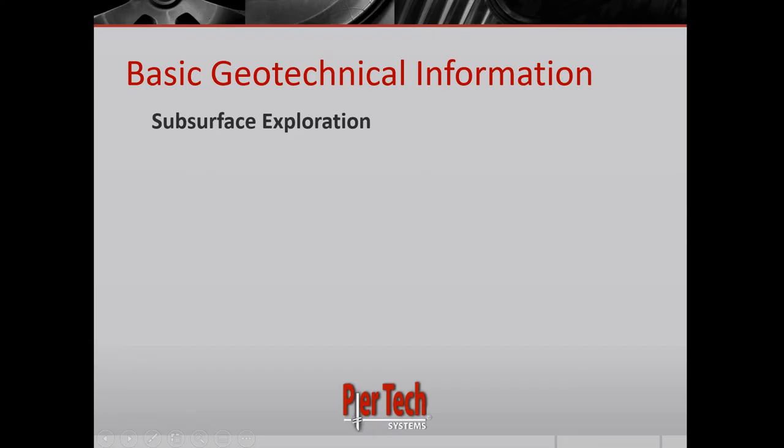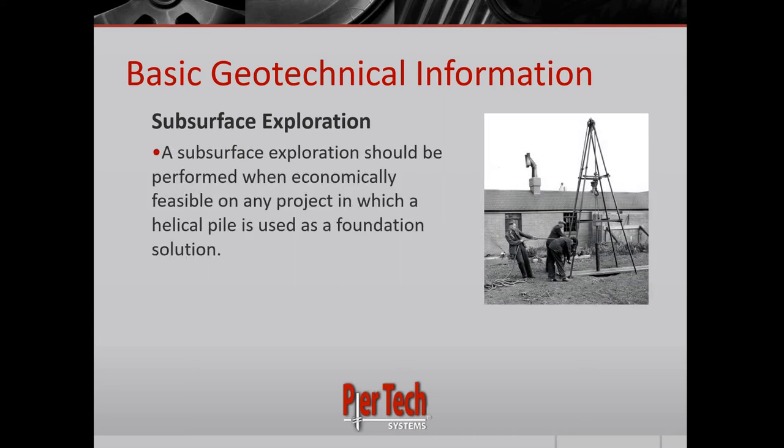A subsurface exploration, or as a lot of you know it, a geotechnical report, is very important to get and perform whenever economically feasible on any project where a helical pile foundation is used. If you go to the IBC, geotechnical investigation is one of the criteria for helical pile installations.